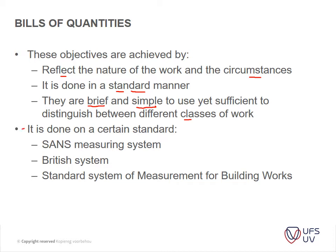There are three different methods you need to know about, although we're going to focus mainly on the standard system of measurement. In South Africa we use the SANS measurement system a lot — engineers use this system. It's a quicker way of measuring but has a lot of rules and regulations, with short descriptions linked to a big specification at the back of the tender. The British system is very similar to our standard system — just take note that it exists. Then you've got the standard system of measurement, which we're going to focus on.